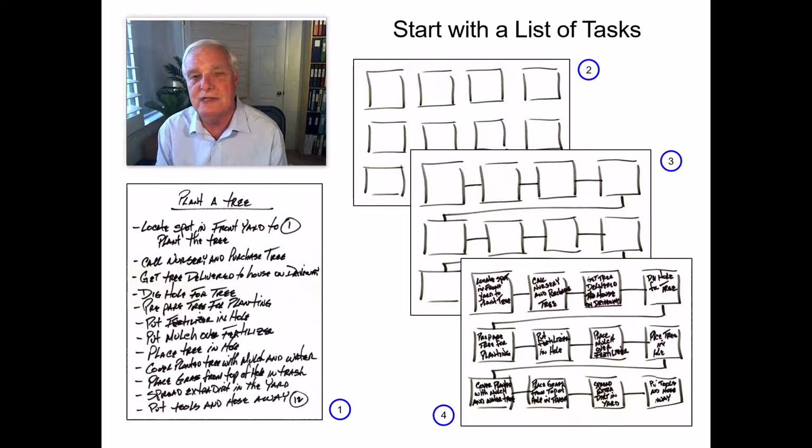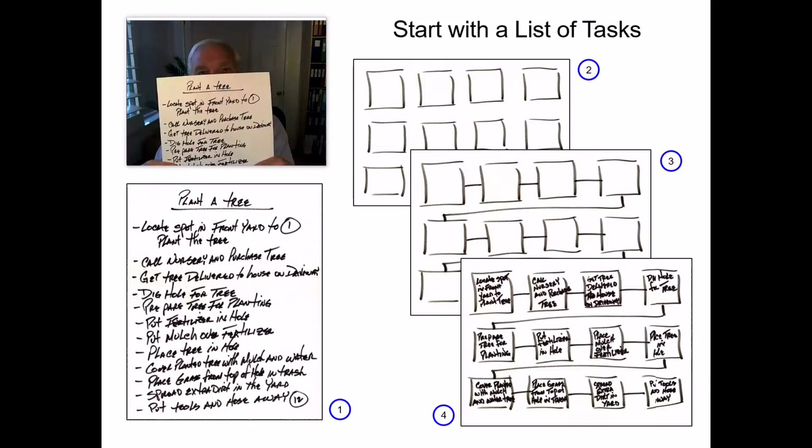Now, let's go ahead and take a peek at a couple other different types of, I'll call it, philosophies. So the first one is from a, I'll call it, microscheduling technique. I don't want you to take every little thing on a project and identify it. You don't need to do that. The first thing you need to do is understand the task. What is the major overall task? The goal, the objective. Write that down on a piece of paper and then line by line fill out what are the pieces necessary for it. Now, in the example I've got here below my image, you can see that we're going to plant a tree. The project is to plant a tree, and I wrote out all the steps associated with that.